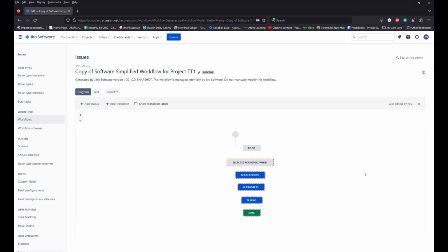You might want to say, yes, at the point where we're going to In Progress, we will require that certain information is mandated. We will require that certain information is done in a way that works for the team. So those kinds of things are what you can then go into your workflow and add as conditions. You can put validators in there. You can do quite a few things on the workflow that control and force the team to do things in a certain way.